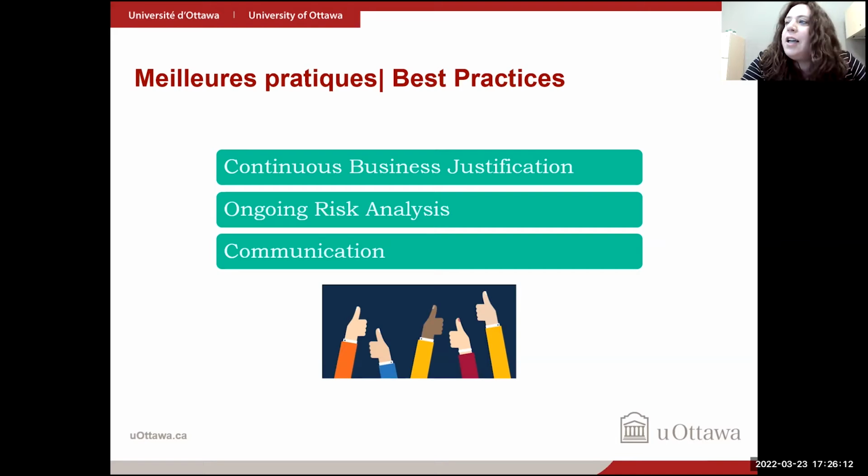Again, throughout your project, I think you need to make sure you have a great risk analysis from the beginning to the end, that you identify issues in a matrix style, where you list them all out and say what your contingency plans are for each, and who's responsible for enacting the contingency plans should they need to be moved forward on. Because all of this, whether it actually happens or not, becomes part of your lessons learned for future projects and for other people to learn from.